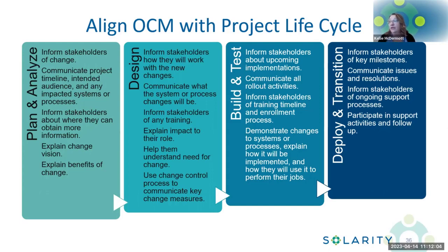And then in deploy and transition, we're going to inform stakeholders of key milestones, communicate issues and resolutions, inform stakeholders of ongoing support processes, and participate in support activities and follow-up. So there's our reinforcement of that change.